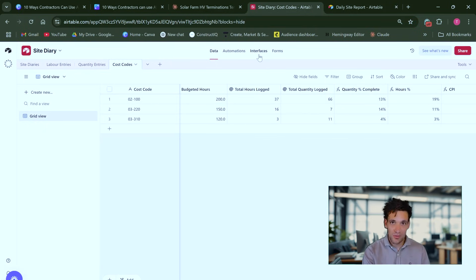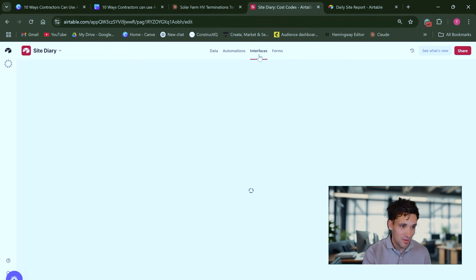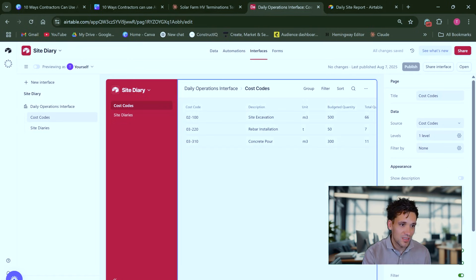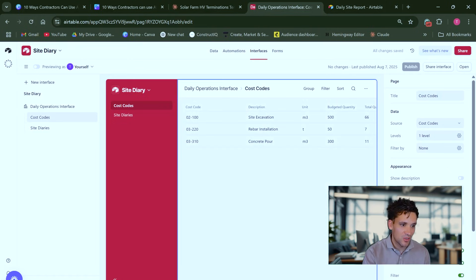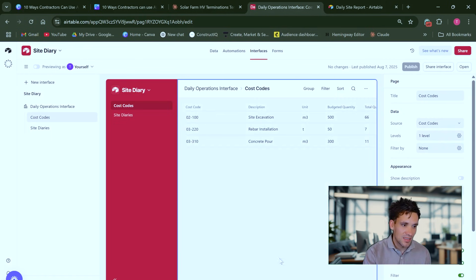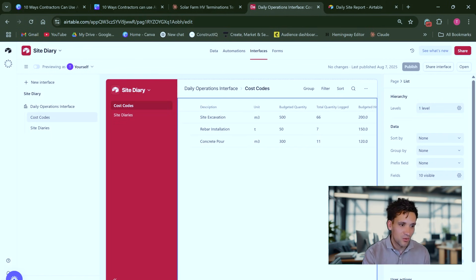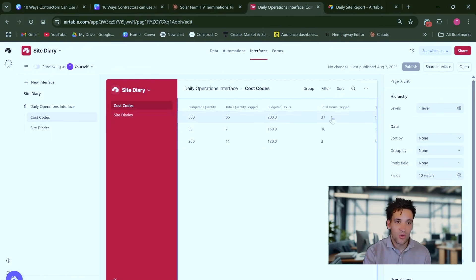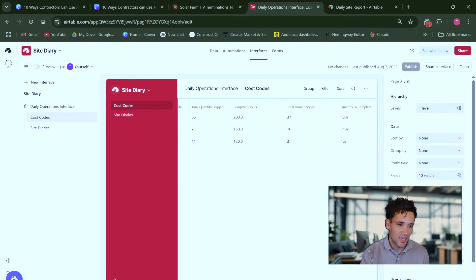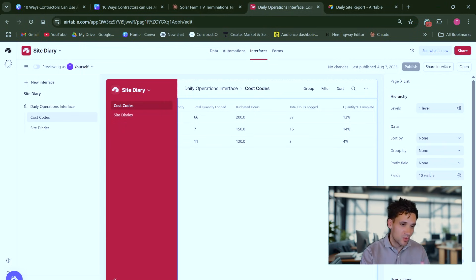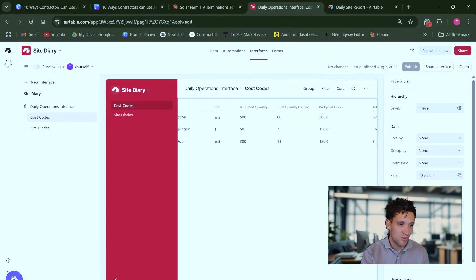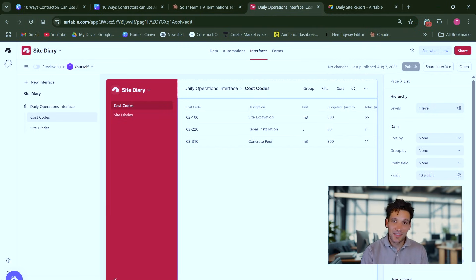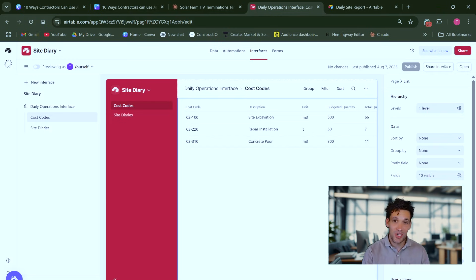Now I built this in about 30 minutes, maybe even a bit less. I put it into a simple interface where users can see for each of our cost codes, it reports on these budgeted quantities, the percentage complete, the total quantity of work, the total quantity logged, and the total hours. It's super simple. You could add much more fancy visualizations. You could track which diaries are completed, what days they're open, who needs to review them. If you put a little bit more effort into it, but you can very simply and quickly build these tools that a lot of the big construction management software companies charge $50,000 a year for.